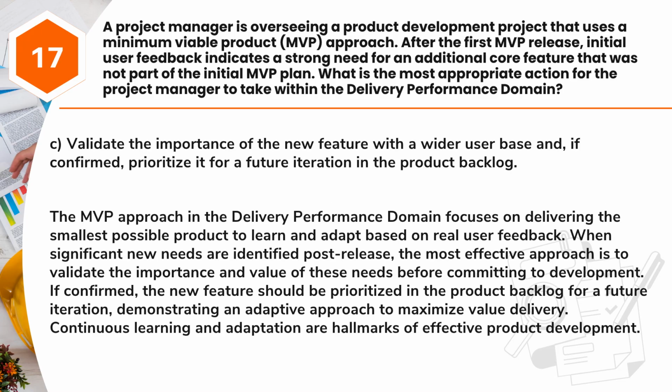Answer: C. Validate the importance of the new feature with a wider user base and, if confirmed, prioritize it for a future iteration in the product backlog. The MVP approach in the delivery performance domain focuses on delivering the smallest possible product to learn and adapt based on real user feedback. When significant new needs are identified post-release, the most effective approach is to validate the importance